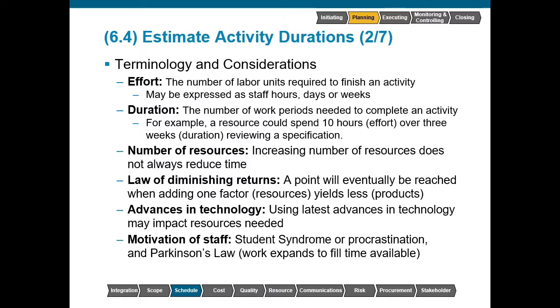Parkinson's law is another consideration we have to take into account, which posits that work will expand to fill the time available. If I give you 16 hours to perform an activity, even if you could realistically do it in 8 or 12, you'll typically find a way to make it last the full amount of time that I'd give you.